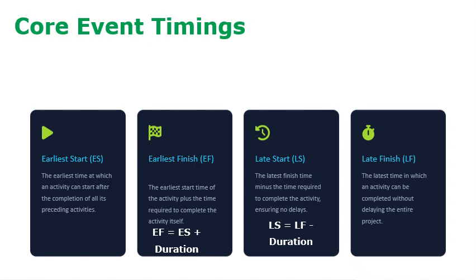Early start is the time at which an activity can start after completing all its preceding activities. Similarly, late finish is the time at which an activity can be completed without delaying the entire project. Early finish can be calculated using the formula early start plus duration, and late start can be calculated using the formula late finish minus duration.